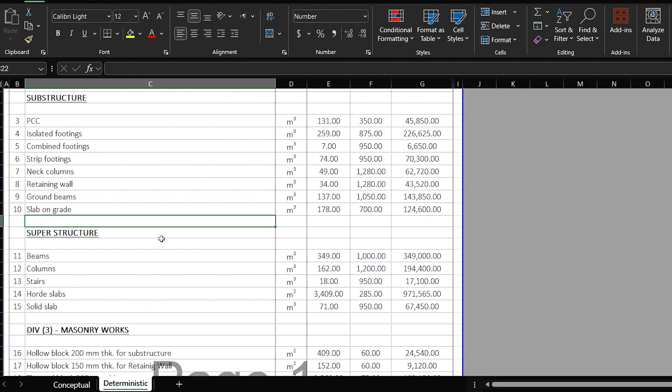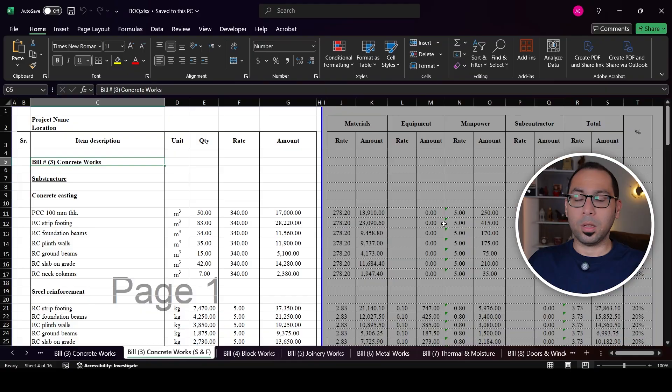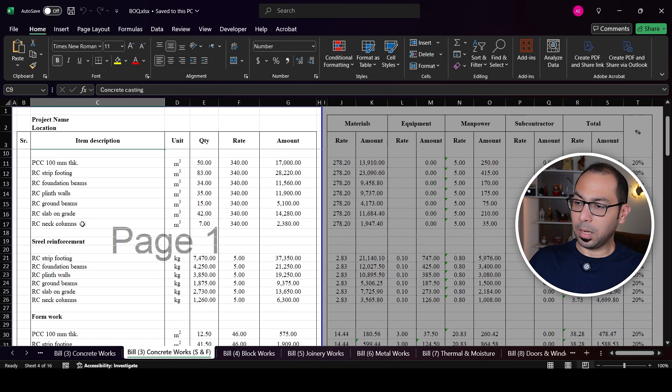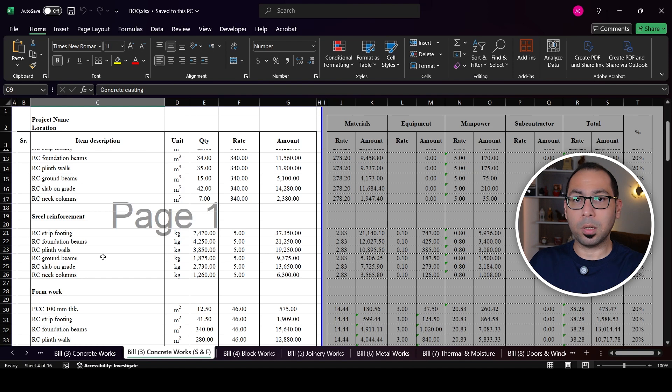To estimate the cost of structural elements, first you need to see how they are measured, because structure elements are usually put in the BOQ in two ways. The first way is if the BOQ is prepared in accordance with Principles of Measurement International (POMI). In that BOQ, concrete works are split into three things: concrete casting, steel reinforcement, and formwork. Quantities are measured as concrete casting in cubic meters, steel reinforcement in kilograms, and formwork in square meters.